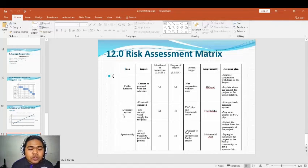Next risk is sponsorship. The impact is not enough budget to proceed with the project. Likelihood of occurrence is medium. Degree of impact is medium. The action triggered is difficulty finding a sponsorship for the project. The responsible person is Muhammad Arif, and the response plan is to collect the budget from the community of the project and try to introduce the project to the public and committee to get a sponsorship.